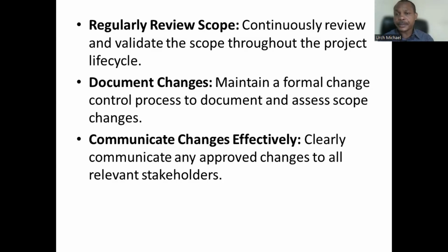Communicate changes effectively. I've said this over and over again, please. If you're making any change, please make sure everyone is aware. For instance, maybe in a construction department, you have the earth moving department, you have the concrete department, and you have the material control. Something comes up at the earth moving, and you decide to increase the depth of the road, but the person in charge of the material calculation is not aware, and he keeps working with the previous scope of the project. Now there's going to be a miscommunication somewhere between the lines, and there could be issues. So that's why it's important that if you're making any change at the earth moving section, everyone should be carried along. The project manager should be able to integrate all the changes. Let everyone be aware.